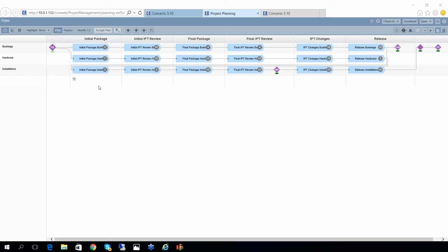And originally, before we implemented critical chain over there, they were trying to manage this project using about 400 tasks. When we implemented critical chain, we brought the number of tasks down to about 75. But with this 2-tier concept, now this project plan can be simplified into about 3 times 6, about 18 tasks.